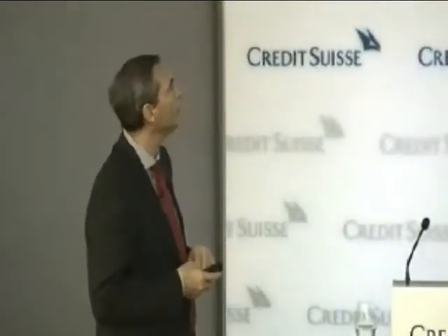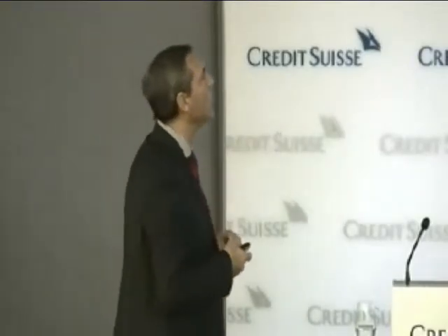Now the big question. To be or not to be. The big question is how to analyze the risk. We can analyze the risk in a qualitative way or in a quantitative way. A few examples. For a qualitative analysis, we have the impact matrix, for instance, or the analytical hierarchy process. The analysis in a quantitative way is the expected monetary value with decision trees, or Monte Carlo simulation, for instance.